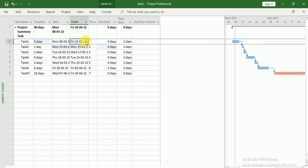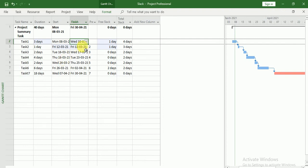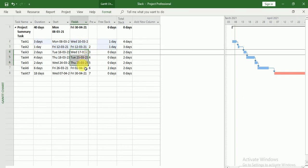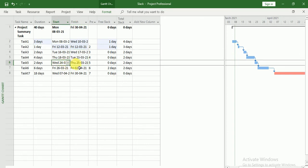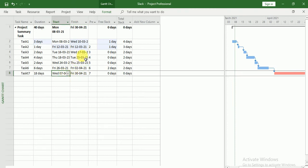So that's why Free Slack lets you know how much you can delay a task. Now here you can see we can delay this task by one day and this task also by one day, but these tasks we cannot delay because this task is going to finish on 23rd of March and the next task is going to start on 24th of March. This task is going to finish on 25th of March, and the next task is going to start on 26th of March, but this task is going to finish on Friday 2nd of April — so in this task we have two days relaxation. So this is the Free Slack.